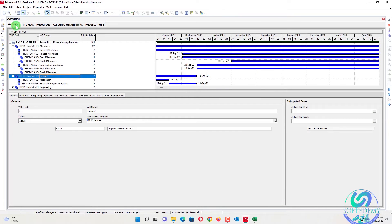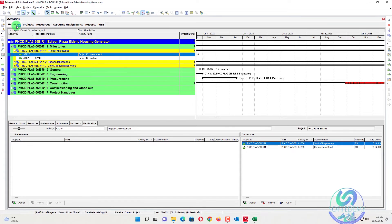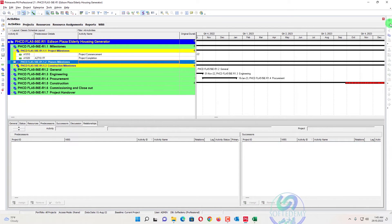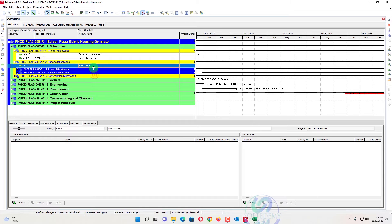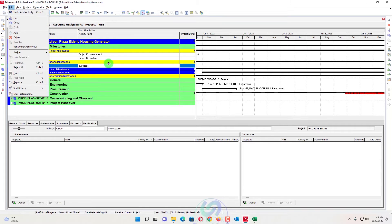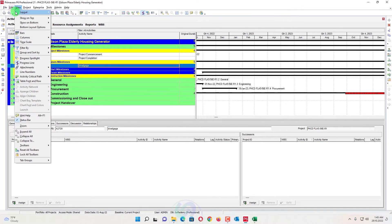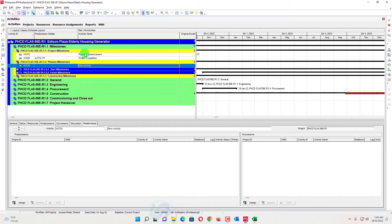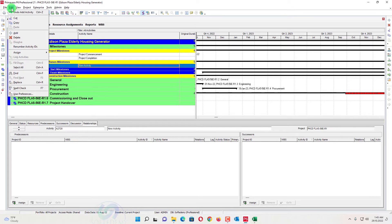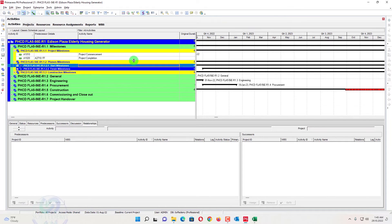Activities are the only area where you can edit, redo edit, and delete with undo available. In the activity area, I will add an activity. You will see 'Undo Modify' — it means editing has also been done. For deleting or adding an activity, there is also undo. When I press undo 'Add Activity,' the activity will be removed. So on editing and on adding or deleting an activity, undo is available.